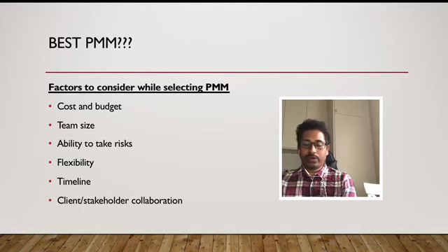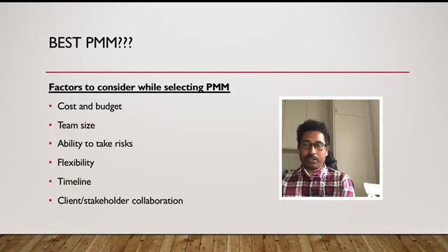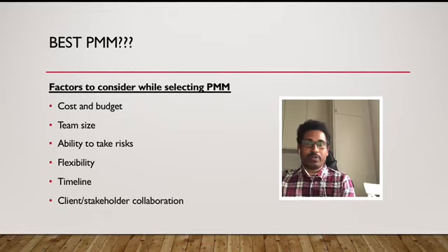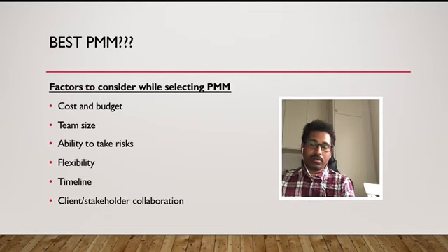And you also need to look into the flexibility, whether you have concurrent requirements to work with and you know what you're going to get out of these. For example, if you know what to do and you know everything about it, and you don't have any upcoming changes, then definitely you need to go to the waterfall model. And if you think you're going to get so many changes in future, then I think you need to go for Agile, and if the requirements are very vague, maybe Kanban helps.